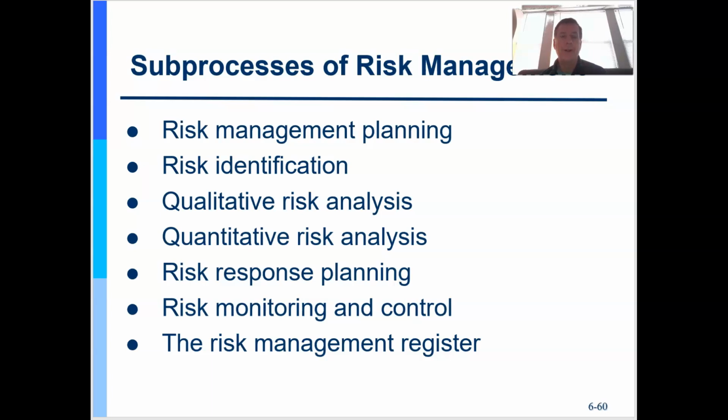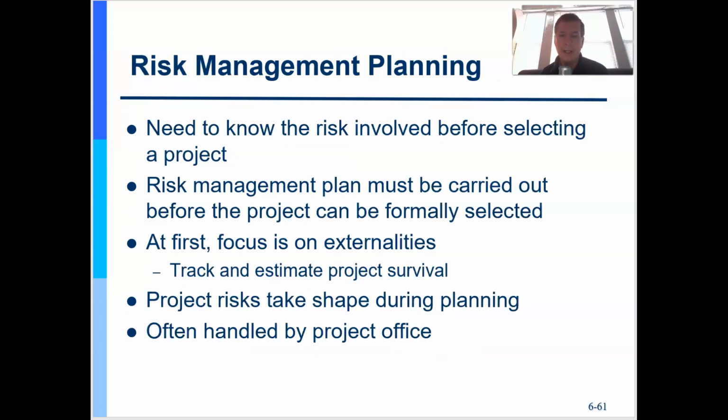You want to develop a risk management plan, which is going to define how you're going to do these other processes, how you're going to identify risks, what's your approach to qualitative and quantitative risk analysis. What is your risk response planning approach? How about monitoring and controlling risks and managing the risk register? Those are sub-processes to the overall risk management knowledge area.